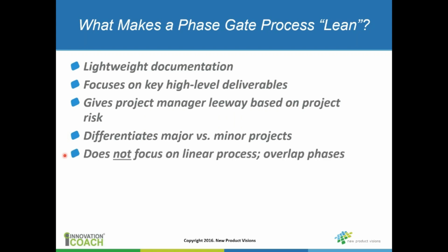And I don't think you should focus on a linear process. If you don't start the next phase before the previous phase is approved, so to speak, I think you can waste a lot of time, waste a lot of resources. I think there are a lot of occasions when you're developing a product where you need to be overlapping phases, and there's nothing wrong with that.